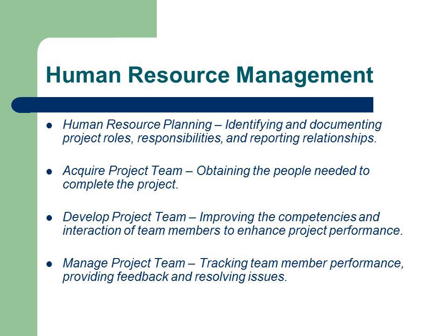Human resource management. Management of the people involved in the achievement of the project objectives is known as Human Resource Management, or HRM. It involves the selection and development of individuals and sub-teams into a cohesive project unit with a common purpose of meeting project objectives. Human resource management requires planning for the most appropriately skilled people to join the project team at predetermined times. It involves recruiting the team members, training, development and performance management, resolution of issues and conflict, and releasing resources at the end of the project.